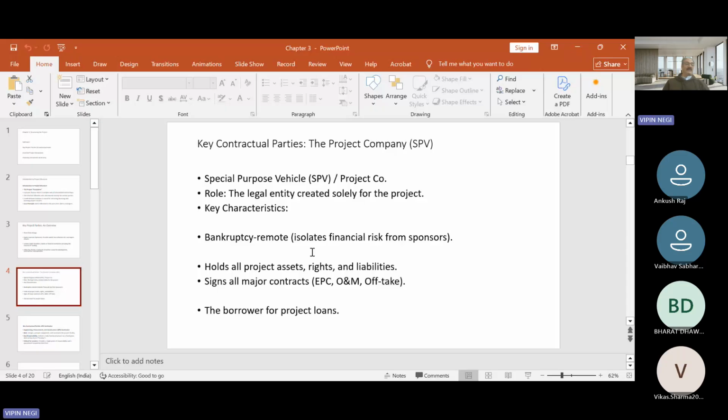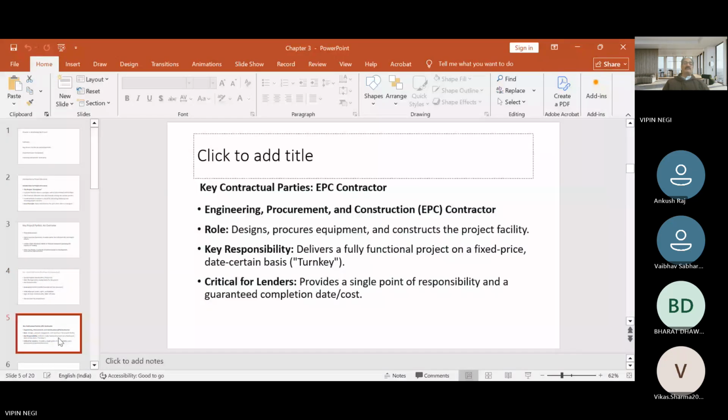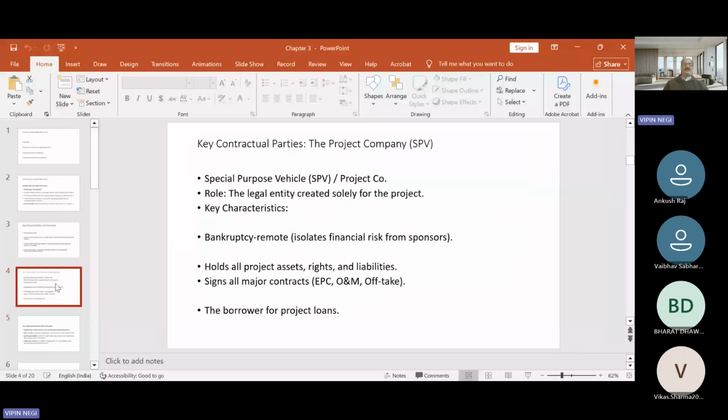So we have discussed the EPC, then the government. Now suppliers. The suppliers are critical in the project development stage. Normally the EPC contractors tie up with the suppliers of material before the construction phase. So basically, when construction takes place, by that time the EPC contractors tie up with the suppliers for raw material.